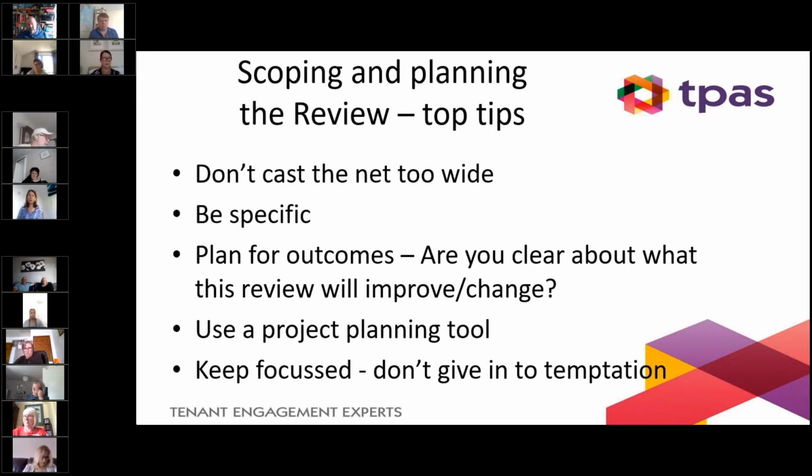Once you've got your scoping done, do use a project planning tool. And I don't mean anything complicated here. It doesn't have to be. It can be if you want. There's all kinds of wonderful stuff out there when it comes to software for project planning. But sometimes it's just a simple table of what needs doing, who's going to do it, when they're going to do it by, and how will we know it's been done, kind of thing. A table can work as long as you've got some kind of plan and process in place.